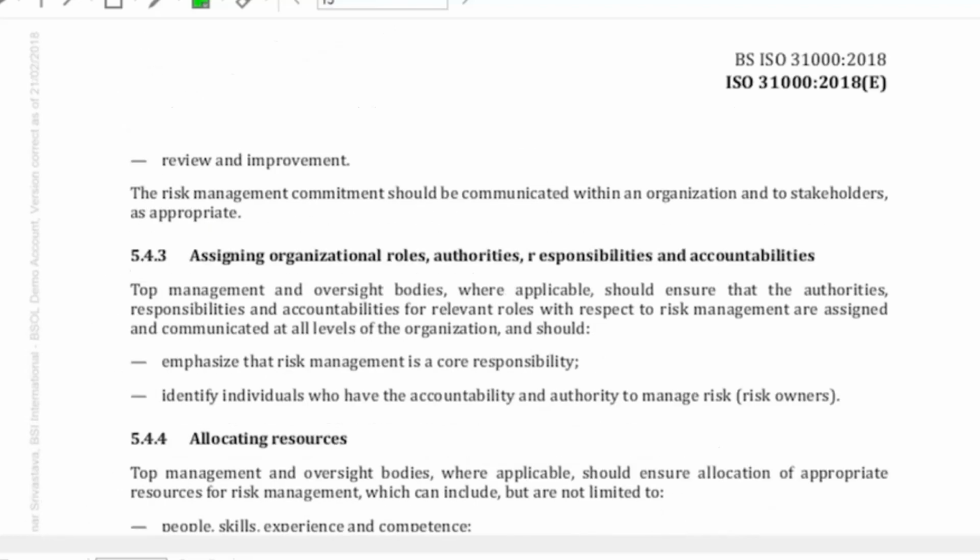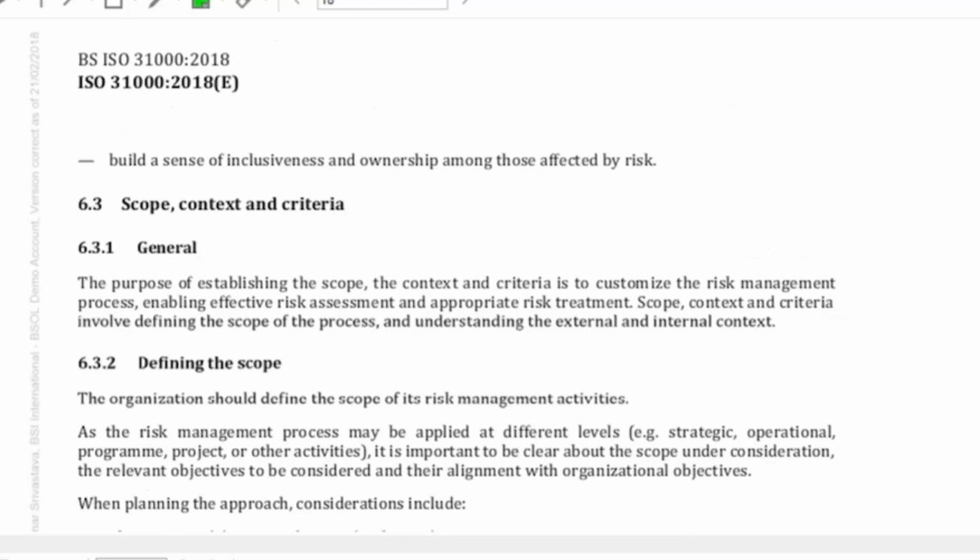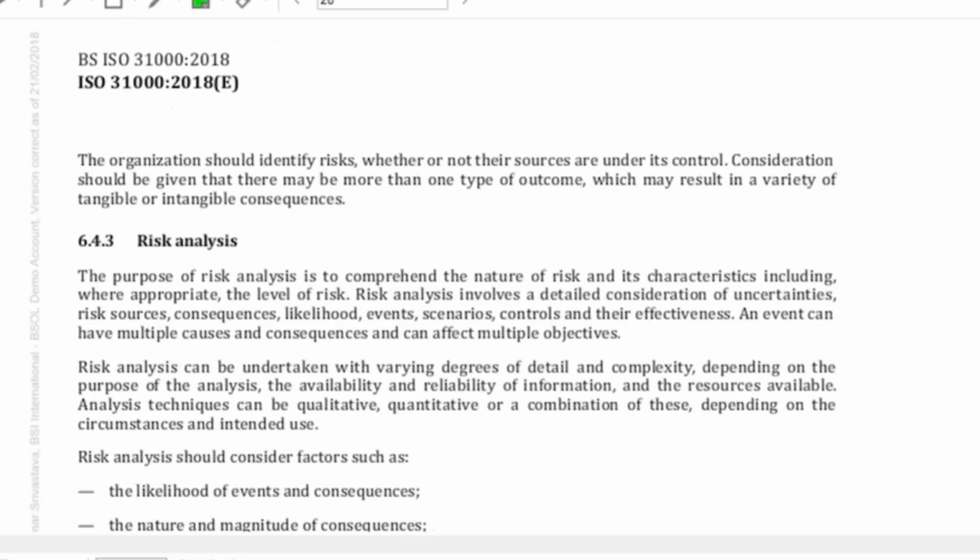Risk identification. Firstly, if you want to review the risk, you have to see which department, which function you are talking about. So suppose I'm looking at legal regulated risk, then I should involve the legal function. Now, at what frequency? At least once in 3 months. What are the latest risks? What are the incidents that have happened? What are the high risks? What are the risk treatment plans in place?